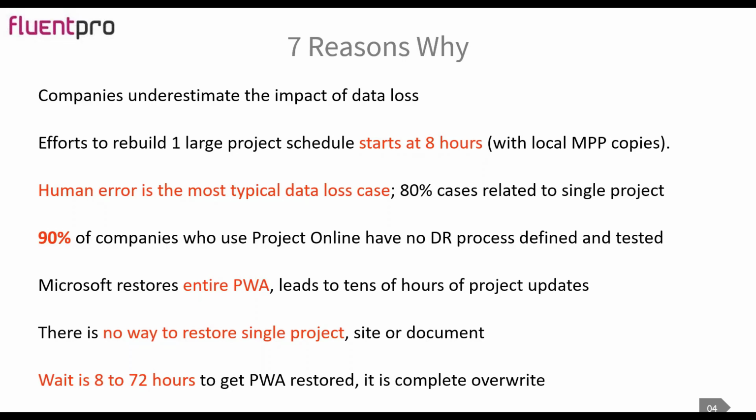If a schedule gets corrupted or overwritten, or some tasks get deleted, maybe it's not a big deal for a project with 50 lines, but when your schedule has hundreds of resources and hundreds of thousands of lines, it becomes a true disaster, and it takes significant effort for the entire team, and not just a single project manager, to restore it from local copies, making sure that everything is correct.